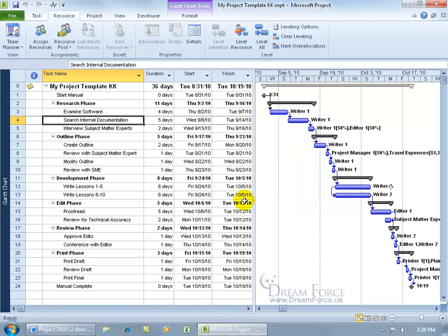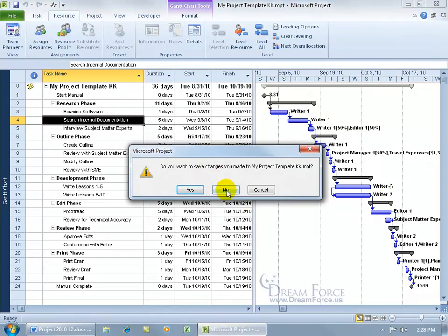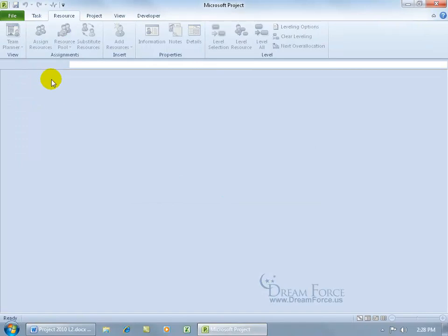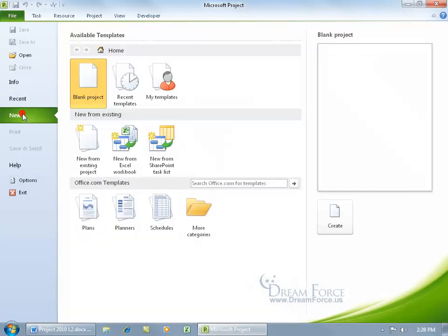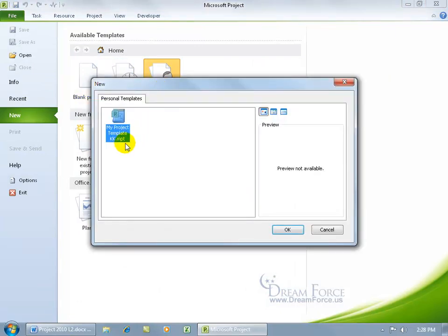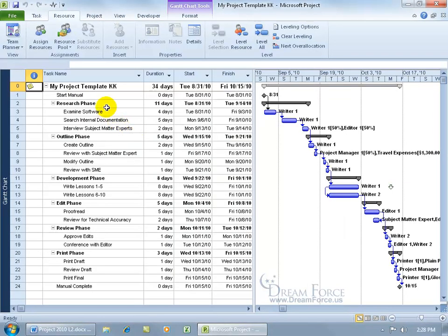Now when you're finished, if we go ahead and close out and don't save this, and we're like, okay, time to create a new project. Let's see, it's going to be for a new software training manual. Oh my gosh, do I have to type in all those tasks? Just come up here, click on the File tab, go down to New, go to My Templates, and there's the template that you saved, which was called My Project Template, and then double click, opens it up. Hey, I don't have to type in summary task, subtask, assign resources to the task. For the project summary task, you just come up in here and you say, this is going to be my...